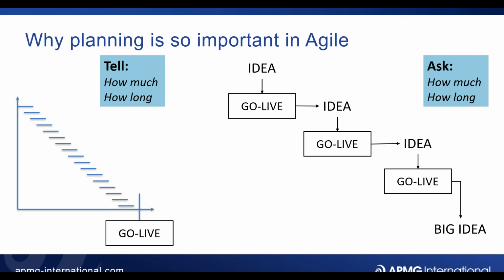So I haven't worked bottom up and added everything together and said, hey, this is what the answer is. I've done the opposite. I've gone to the business and said, what do you want the answer to be? Because I can deliver you a scan your goods on your phone. I can deliver you one with all the bells and whistles on and spend an absolute fortune on it if you're going to give me that much money. But if you're telling me I've got to turn this around in 6 months, then I'm going to give you a very basic service, but I can still give it to you. Yeah, but I'm going to work within the constraints that you set me. How much money have I got and how long have I got to deliver it?